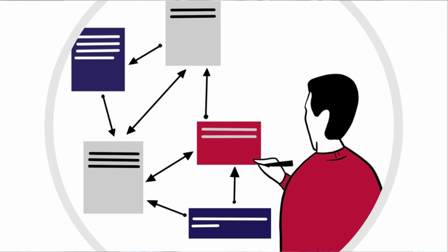In total, with the preparation, collaboration and analysis stage, our discovery lasted for 5 weeks. During the first 3 weeks, in addition to the online workshops with the stakeholders, our team also conducted the client ecosystem audit. In particular, we investigated the customer websites, backend systems and made a deep dive into the client knowledge base.